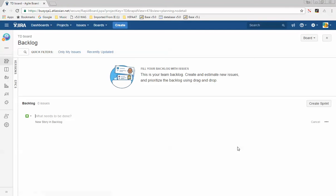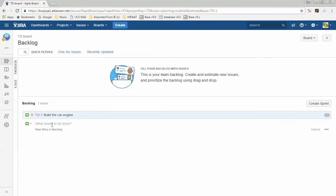Now I have a project that is empty, and this here is my product backlog. Typically a product owner will go into the backlog and create requirements — requirements are called stories in a scrum lifecycle. For example, let's say we're trying to build a car. The first requirement could be: build the car's engine. The second story could be: build the car interior.